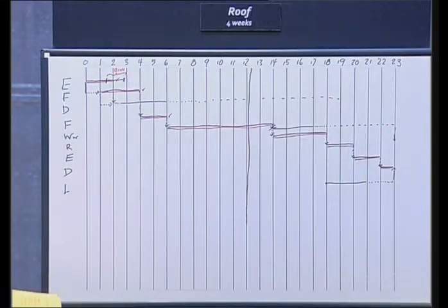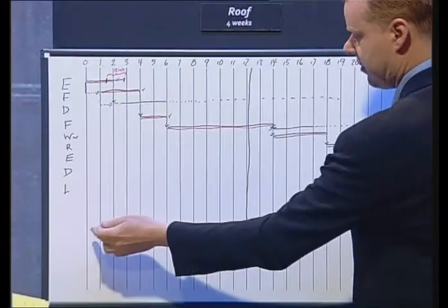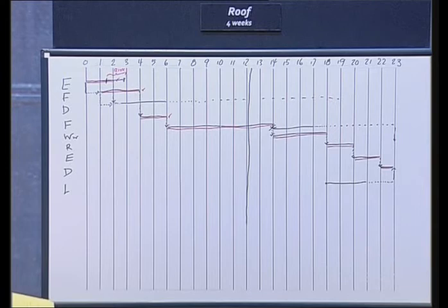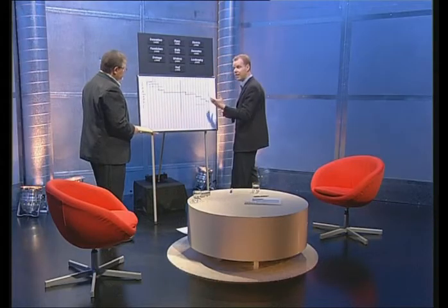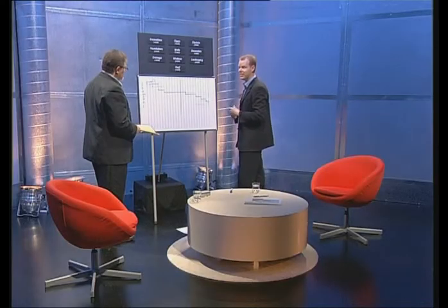It also may lead to creating a new critical path through your project. As you reduce some activities, others may then become critical. Right, and that's primarily about resourcing issues? Yeah, and going back to the critical chain concept, if I were to apply resources to each of these activities, which is very easy to do, and again, software tools tend to allow you to put these in to enable you to level and optimize your resources, but it would possibly move your critical path through different activities if you've got resource constraints on any one or several of them.